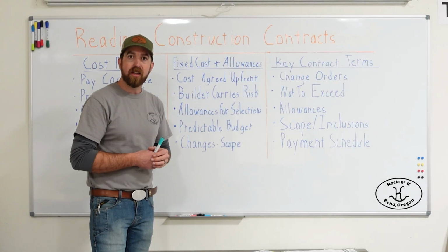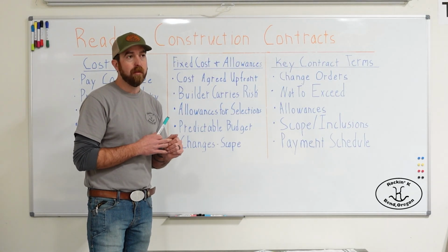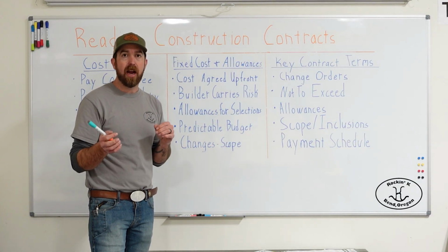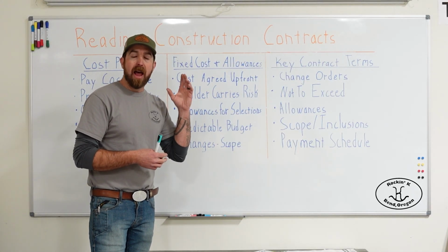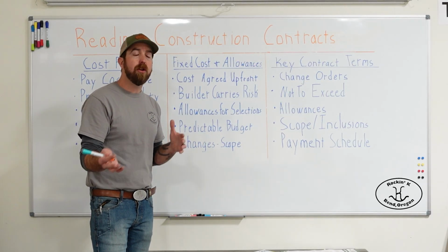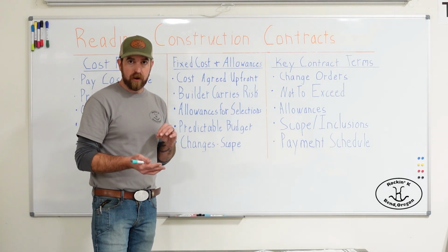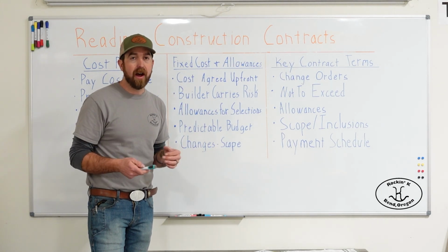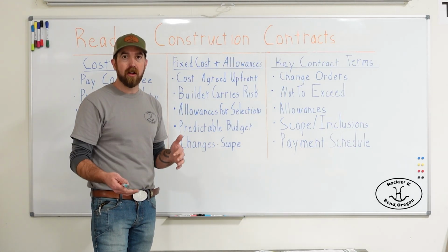So in the case of the Goldilocks kitchen, a $6,000 allowance per slab. Let's say your kitchen is going to require 2 slabs. You go out and find a slab that includes fabrication and install at $5,000 instead of $6,000. Well, times 2 slabs, you get $2,000 taken off that total price. Conversely, if you find nicer ones that you really like, you want to have it, but they're $7,000 per slab, you've got to pay $2,000 extra.